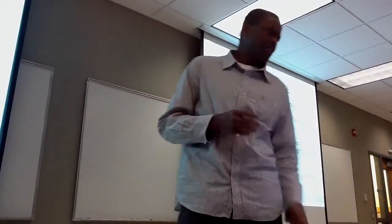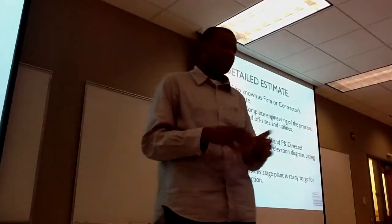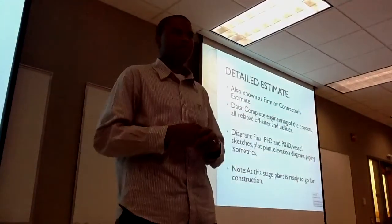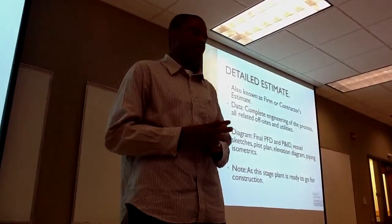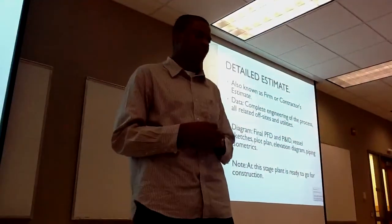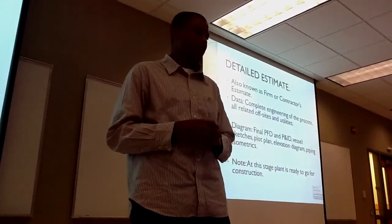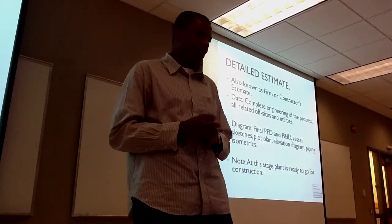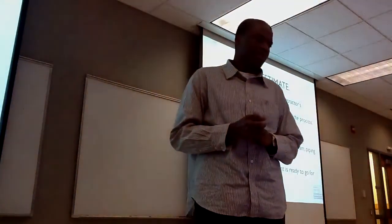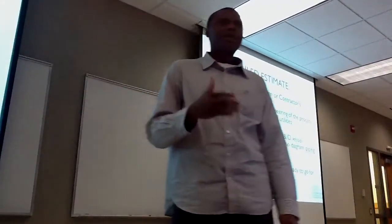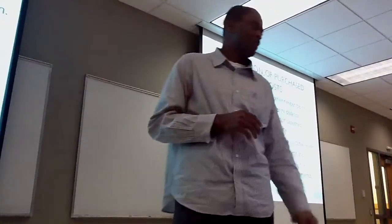The detailed estimate is also known as the firm or contractor's estimate. This is the final and most complete estimate needed to proceed with building the plant. The data required is complete engineering of the process and all related off-site and utilities. The diagrams required are the final process flow diagram, the P&ID, vessel sketches, plant layout, elevation diagrams, and piping isometrics. At this stage, construction of the plant will be initiated.